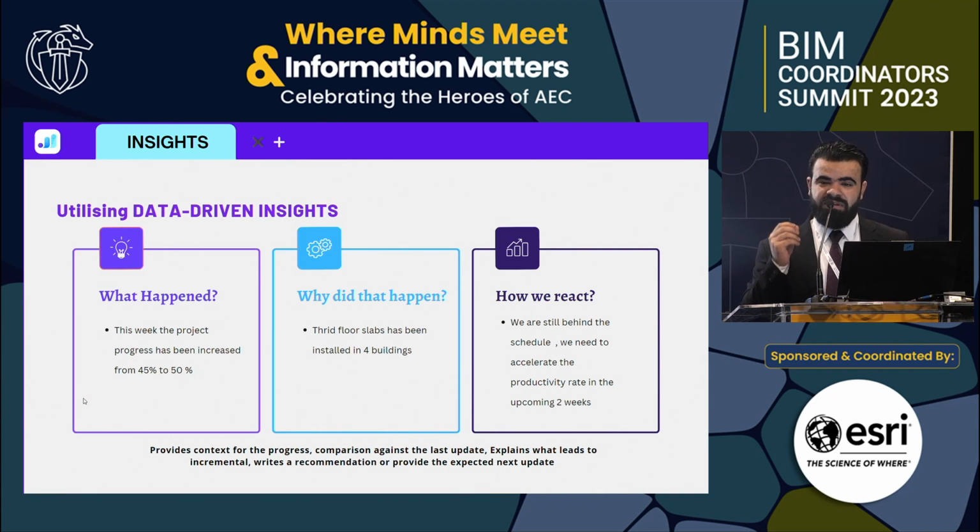You need to start with what happened, to quantify the 5% against the progress you have on site. So the first question is, what happened? The project performance went from 45% to 50%. So good, we got 5 extra percent. It's perfect. So why did that happen? Should you have done more? If it's just 5%, should you have done 10% and you did just 5? Or should it have been 2% and you're doing well and you got 5? It will give you the right understanding and how you react.